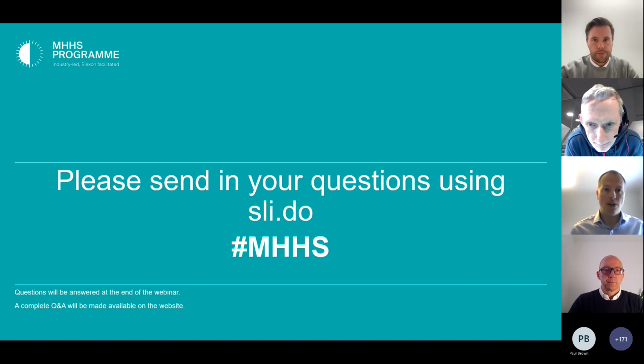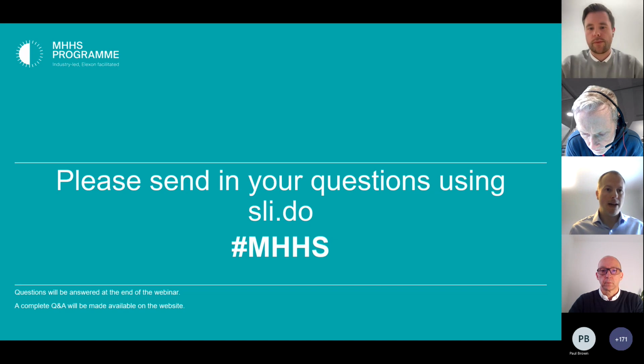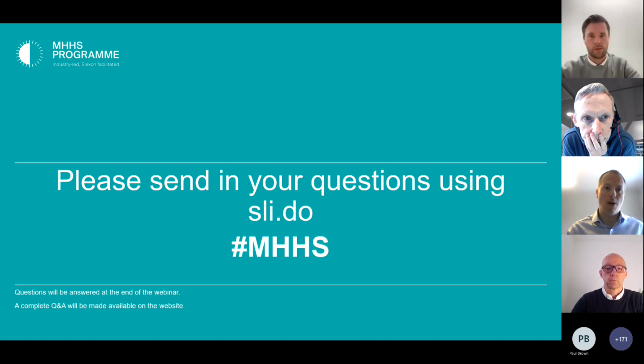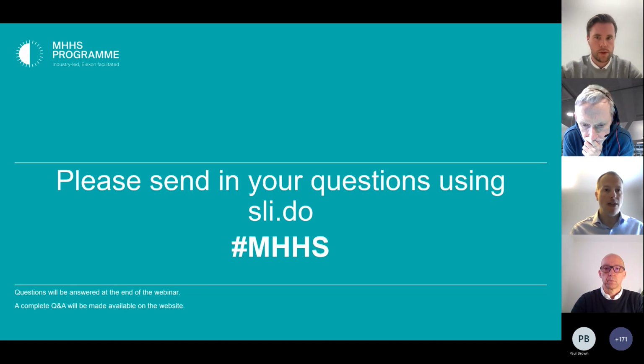Yeah, so if I just pick that one up, a code of connections was developed last year. It's about 80% complete. That was taken to the SDWG in around August, September, and was reviewed. The remaining 20% are design dependent elements from the DIP design. So as Paul previously stated, we're going through that design process at the moment. As those remaining 20% of the requirements for the code of connections drop out of the design, that will feed into the code of connections, and then we will publish them.